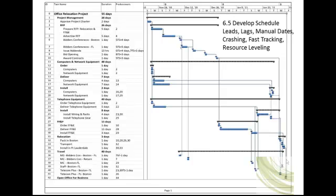Another example of a lag would be the task Pour Concrete. Concrete must cure for two days before the next task can be performed, hence a two-day lag. A lead, on the other hand, is a time constraint before a task. In our example project, the project manager must fly from Boston to Florida to attend a bid conference. In order to attend the bid conference, the project manager must fly to Florida one day before the conference.